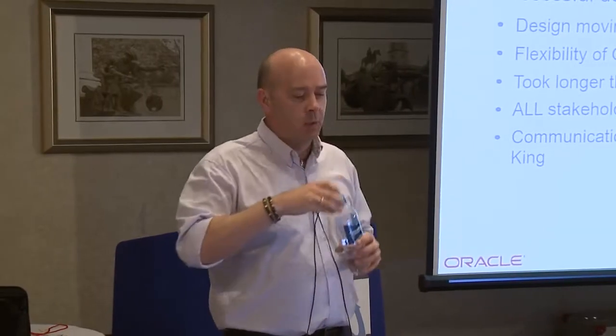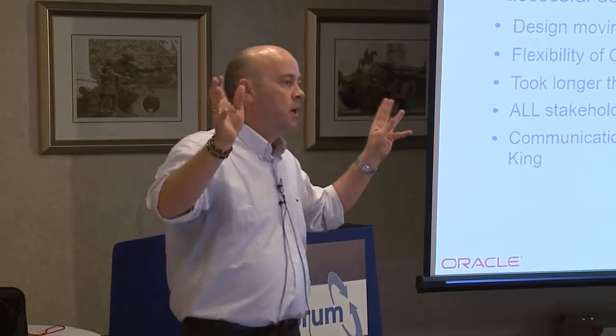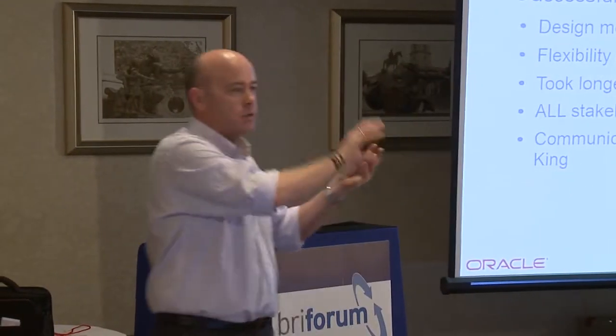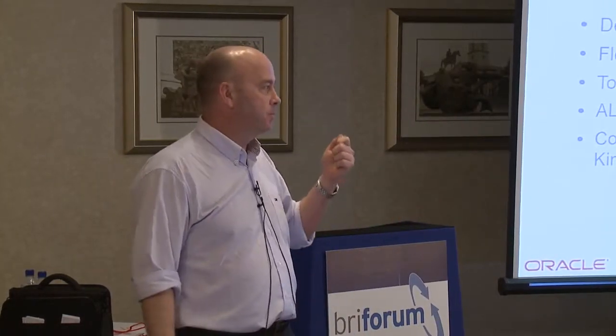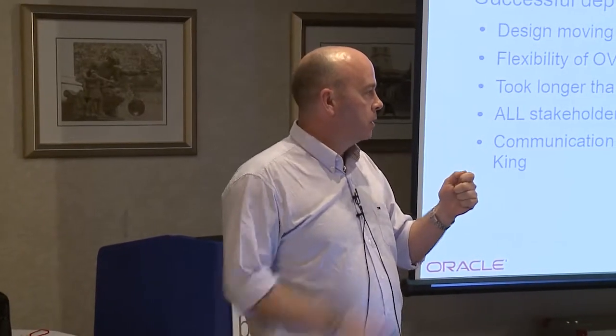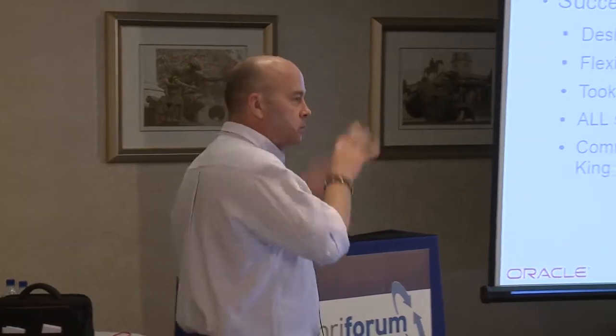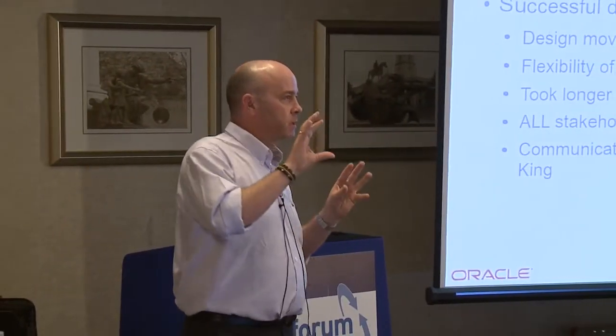And this is where I say it's an infrastructure project as well. If you're looking at bringing in all those technologies, you've got to make sure that all of those bits are going to fit in with what you're doing on the desktop side, and the desktop's going to fit in on that side. And smart cards seem to be the one thing that makes everybody trip over. They go, well, we've got this one, oh, I can't get that one to work, because that won't work with a door access system. So you end up walking around with about 5 different cards. That's why I'm saying it's an infrastructure project. The implications outside of just the desktop are quite significant, and they need to be looked at as part of that project as well.